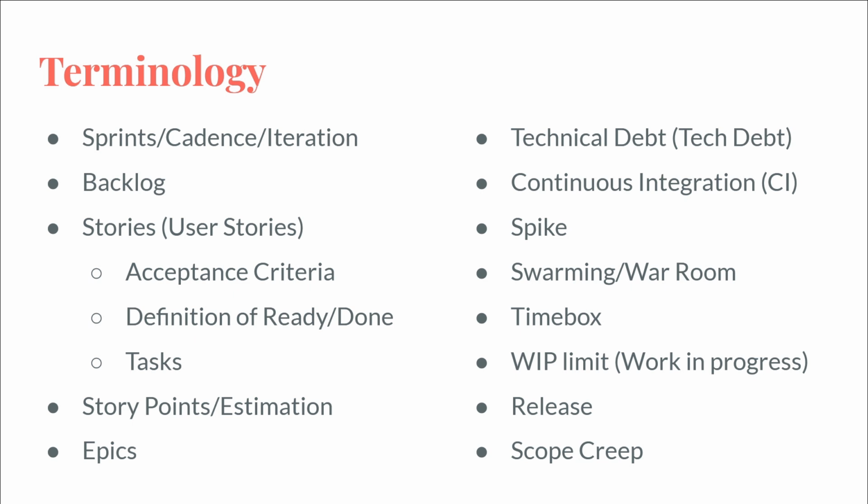And pretty soon we're going to be getting out of that other system, which means we need to port all of its data into our system, and we need to make a bunch of pages to let users see that data in our app and edit that data in our app. And so that's going to be a lot of pages created, a lot of new backend routes created. So it's going to be a lot of work. And so we're going to make a lot of tickets around that. And all of those tickets are going to be related to solving the same problem, that same big problem. And so they'd all be listed under the same epic.